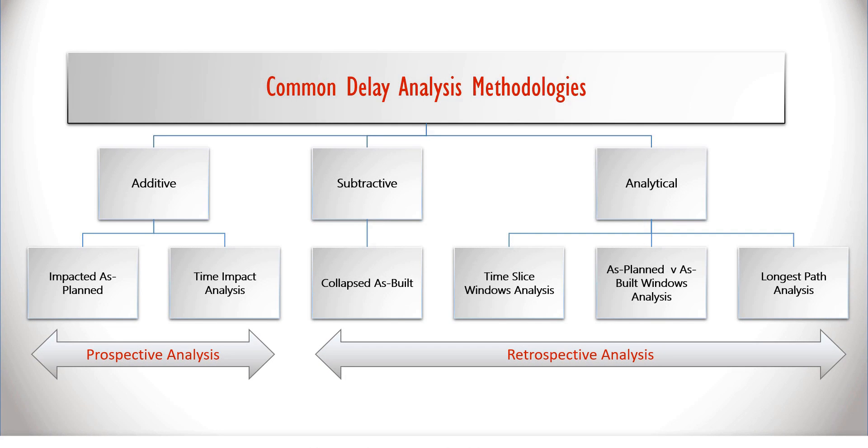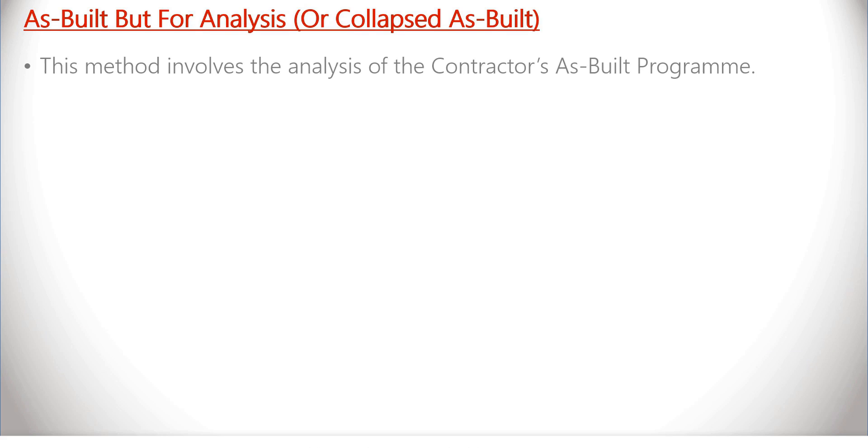In this module, we're going to look at an as-built but-for or a collapsed as-built analysis. This method involves the analysis of the contractor's as-built program.